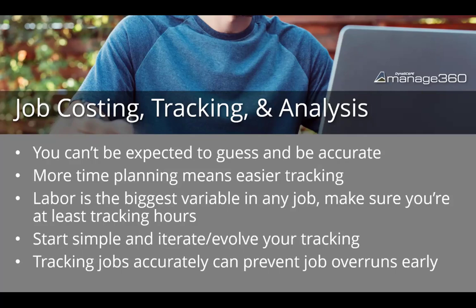Tracking jobs accurately can prevent overruns early. If you're tracking every day, or let's call it every other day, you can monitor and really see when things are starting to perhaps come off the rails, and do what you can to prevent that, so that finally the job is on time and on budget. Essentially, that's what you're working towards: a profitable landscape project.